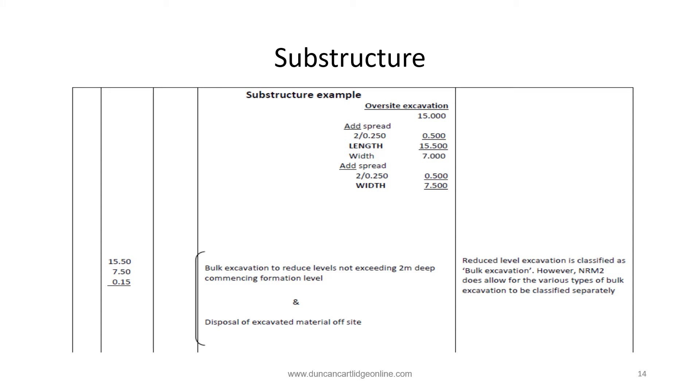So here we go with the worked example. In this case we're using traditional setting out. In other presentations spreadsheet applications are used. It may be a good idea to print off the drawing on page 11. To the external dimensions of the walls we add twice times 250 millimeters to give the overall footprint of the excavation 15.5 by 7.5. The reduced level excavation is 150 millimeters deep. Note as previously mentioned the excavated material has been removed from site.